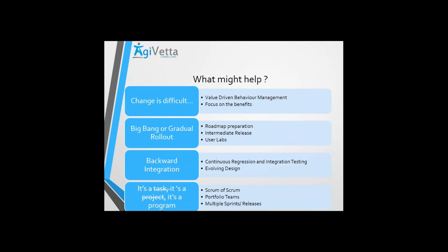The concept that I've always been telling here comes back into the picture: the past, present and future. So every cycle, devote some time to look into your past behaviors, the defects, the challenges, focus on developing and updating new features, and focus on your future backlog. What do we need to do next? So the PPF rule comes into the picture here again.